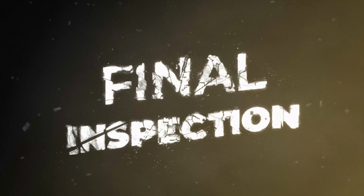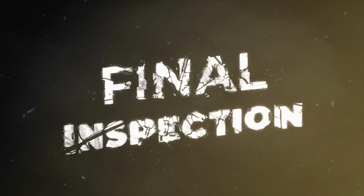So typically when I go do a trim out, I do all of it at once. I will bring all my service materials out. I'll bring all my receptacles, my switches, my plates, all of that stuff, and I'll just start ripping through the house. And once I've gotten all of it done, I'll call both inspections in. So I'll have the inspector come out, and while he's there, I will say, hey, will you please do a service inspection and a final inspection?